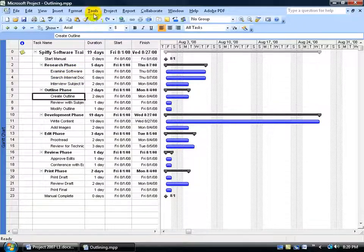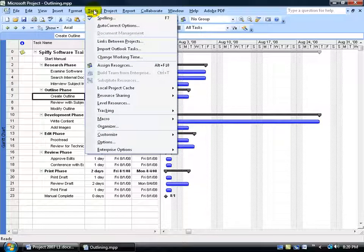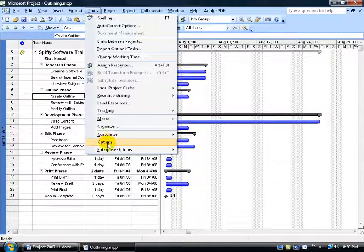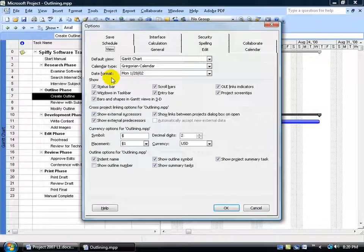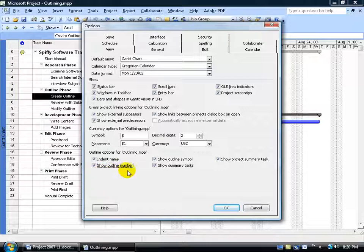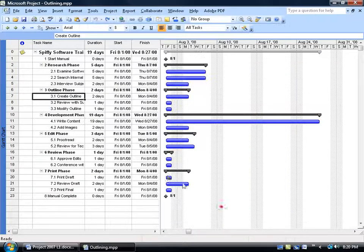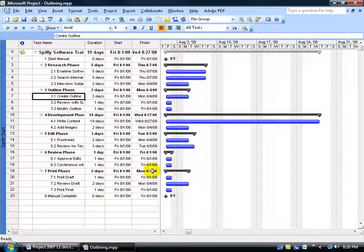In fact to turn this on, just come up here, click on the tools menu, go down to options, it's on the view tab, come down to the bottom and check the box, show outline number, and click ok. And there you go.